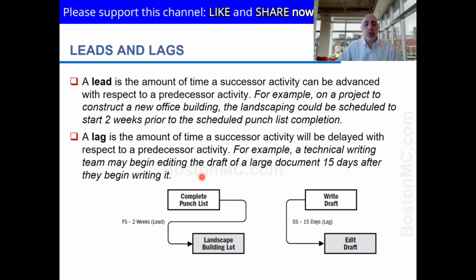This way you can have proper timing on your schedule to indicate that. If we have to wait for something to dry up, we also use lags. If we have to wait for approval because it takes that long, 3 days, 5 days, then we use lags. We use lags for waiting periods, and that makes your schedule more realistic.